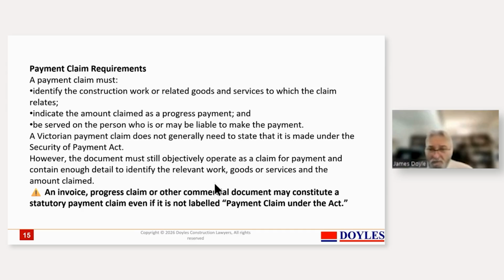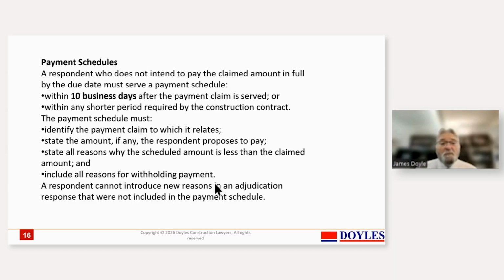So we then look at payment schedules. Now, of course, payment schedules most particularly relate to principals, but they also relate to contractors. And every contractor fundamentally has subcontractors. And when you've got a subcontractor, you've got to make sure, as he's usually doing construction work, that you've responded within the appropriate time and that you put down all reasons, and particularly that the reasons relate to the contractual liability to pay.